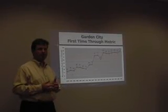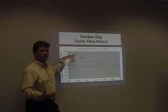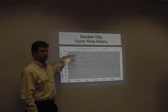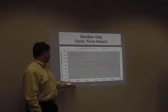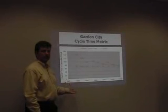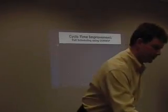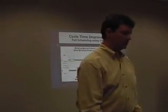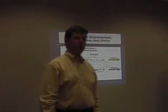You can imagine what that was doing to their delivery performance and cycle time. When we started, cycle time was about 142 days — roughly five and a half to six months. They set a goal of 70 days, and over the course of about 10 months, they were able to hit their goal. They did it the same way Alcoa did — they set the CONWIP target, decided how much WIP they would have, and released more work onto the flow path only when the flow path needed more work.